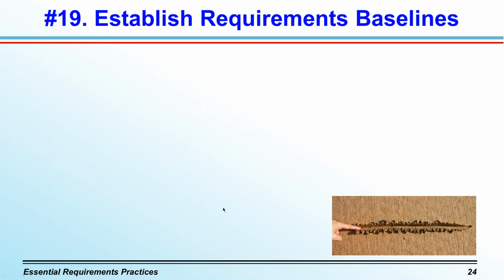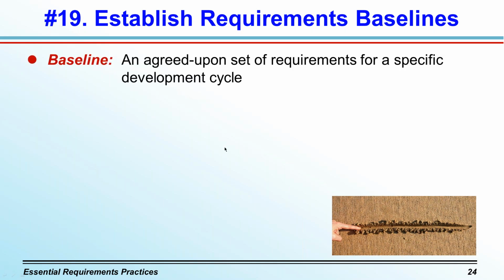So let's say a little bit about the requirements baseline. At some point, as the BA, you've developed a set of requirements and confirmed that they describe a suitable solution. The next step is for the development team to commit to implementing a subset of those requirements in a specific time frame or development cycle. And that's all a requirements baseline is. It's an agreement. Establishing the baseline isn't a freeze. It doesn't mean that change won't happen. It will. But the baseline assures everyone involved that the team can move forward with development of that part of the product at a low risk of major changes.